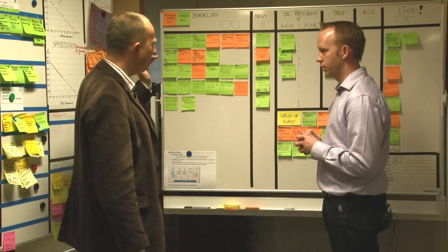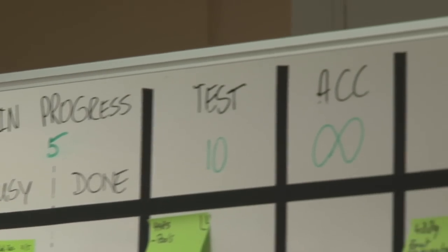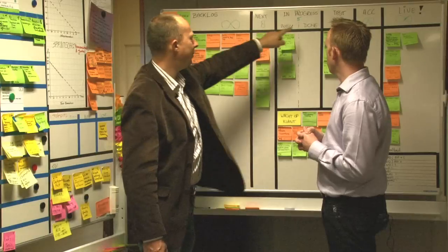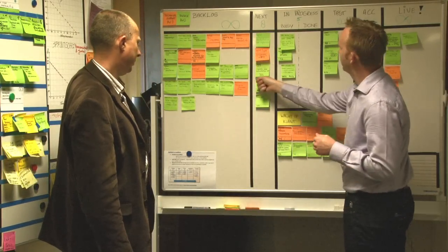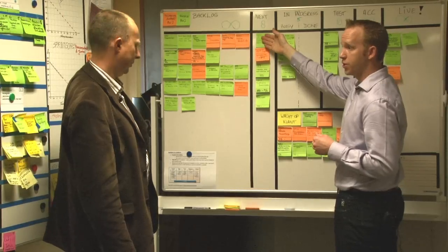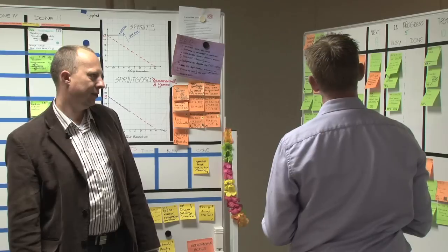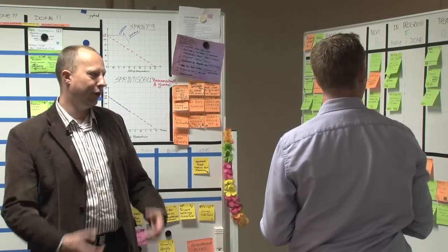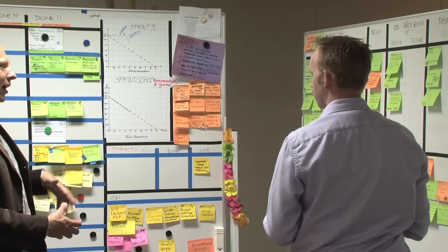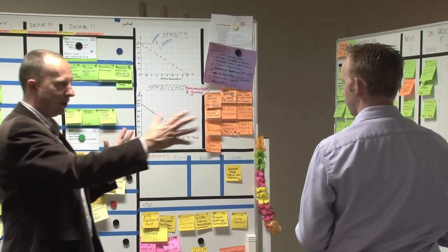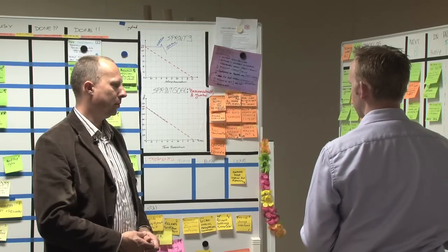Okay, and then issues move as fast from next to in progress, test, acceptance to live. And these are the work in progress limits? Yep. When the team does have room, they pull in another issue, actually the top issue. So we can serve our internal customer and our external customer at best. Okay, so for the development work, you have this Scrum board, with the burn down, the definition of done and everything. And for the issues, you just structure that by a KanBan flow with issues. Exactly right. Cool. Yep. Cool.